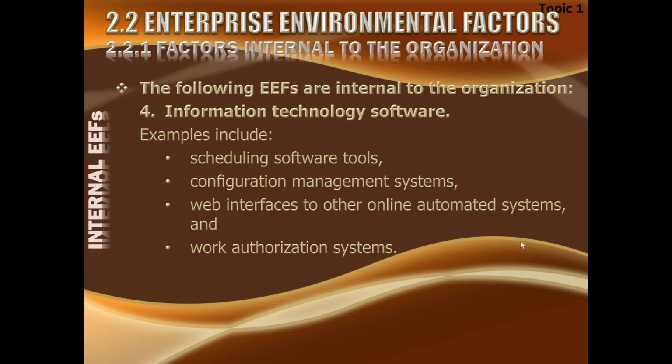Though it is a very good system, as explained by Faisal, it is even better that whenever you want to start a work, although I have told you that you will come daily in the morning at 9 o'clock and start this job, daily at 9 o'clock you will come to me and get the authorization of any work you are just going to start. That means you are logging your time with me that I am starting this work now, and when you leave, you will log that time with me again. That is a work authorization system. In a way, I have authorized you to work from this time to this time, and therefore it can be used later for analysis purposes.